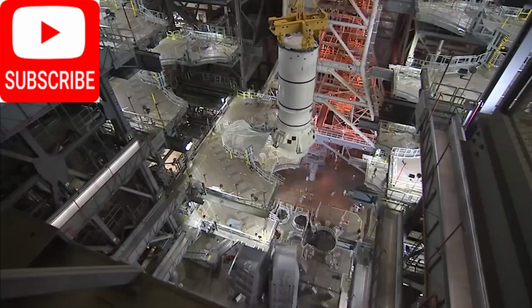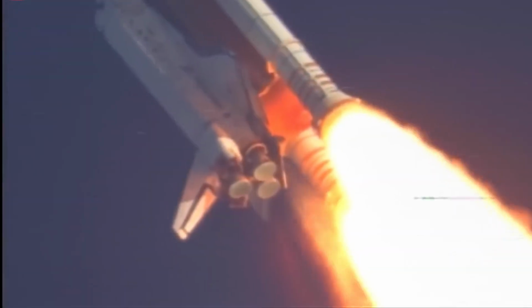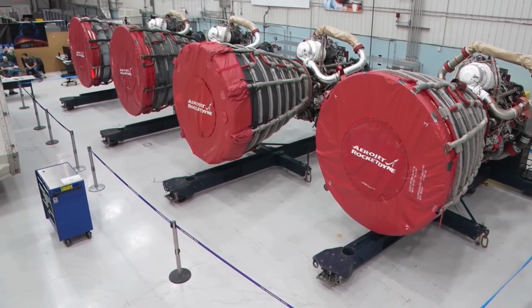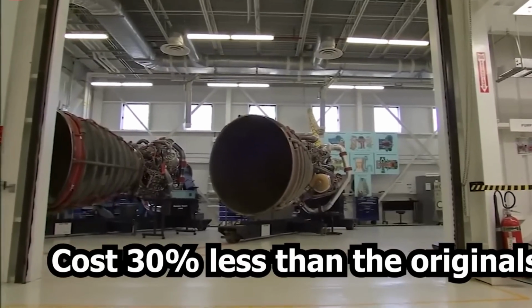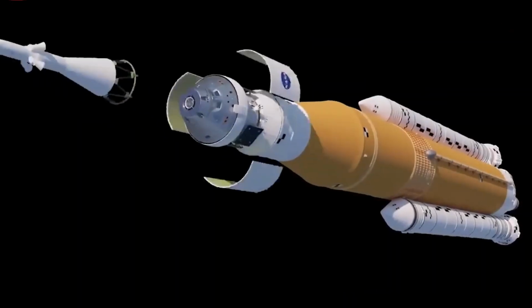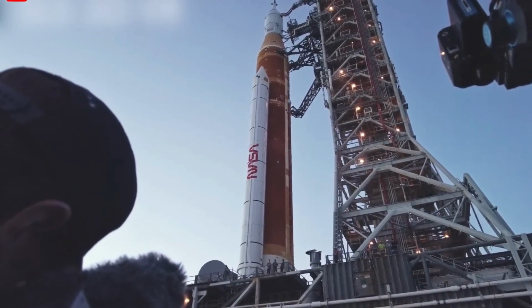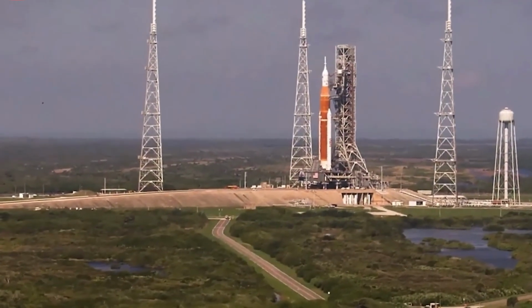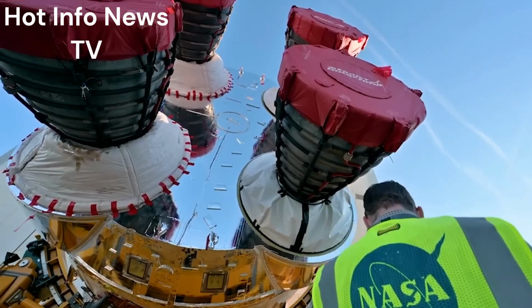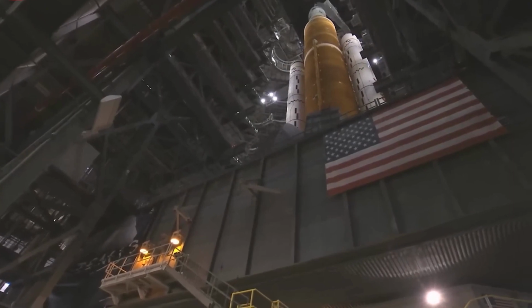The solid rocket booster also has significant overruns, particularly with its propellant liner and insulation, a new component that replaced an asbestos-based insulation used on shuttle-era boosters. That work started as a $4.4 million contract modification in 2011, but Northrop ultimately charged NASA $253 million for the work, including $28.5 million in award fees. NASA contracting officers objected to paying the award fee, denying 2 requests by Northrop for the fee. The OIG report noted that agency officials then appeared to go around standard procedures by convening an independent assessment team of former NASA employees, who recommended the agency pay the award fee. The report called that effort a significant and continuous disregard for agency regulations and official processes. NASA eventually agreed to pay Northrop $24.5 million.